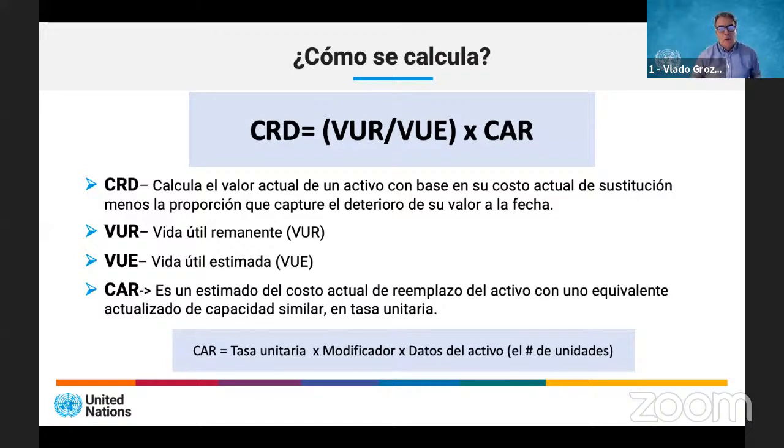Costs are also associated with material, plant, labor, engineering fees, administration costs, and all other costs necessary for replacement. Also, we should include planning costs when we want to replace or renew our assets, and supervision costs where applicable.